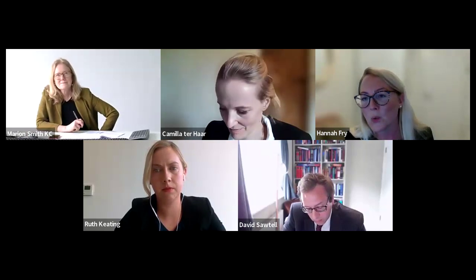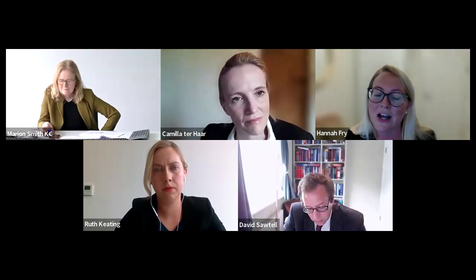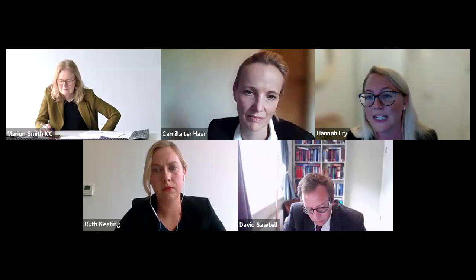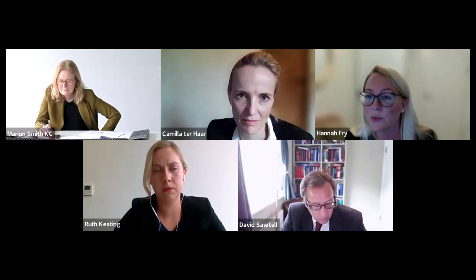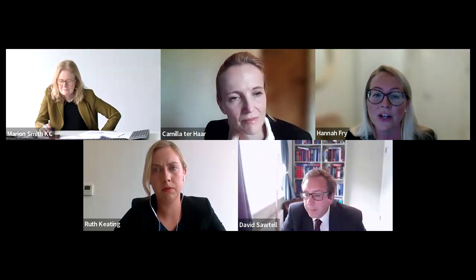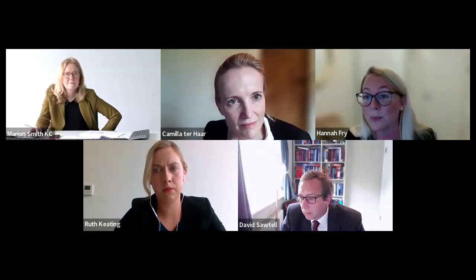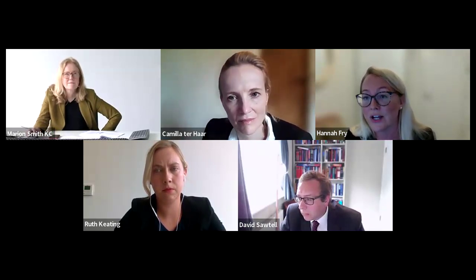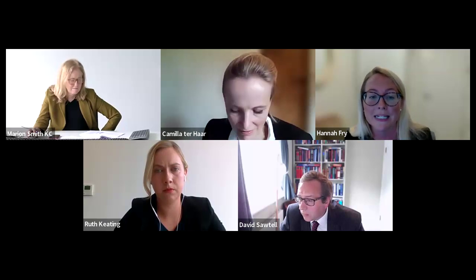So to pick up on what Ruth was saying in terms of relevant events, first to look at grounds of termination. So as well as the 2 new grounds for termination for insolvency, the moratorium procedure and the compromise or arrangement procedure, which I've just taken you through, the list of events entitling either party to terminate has also been expanded. So clause 8.11 now includes first, epidemics. As we've realised, this is something that's followed post the COVID-19 pandemic.